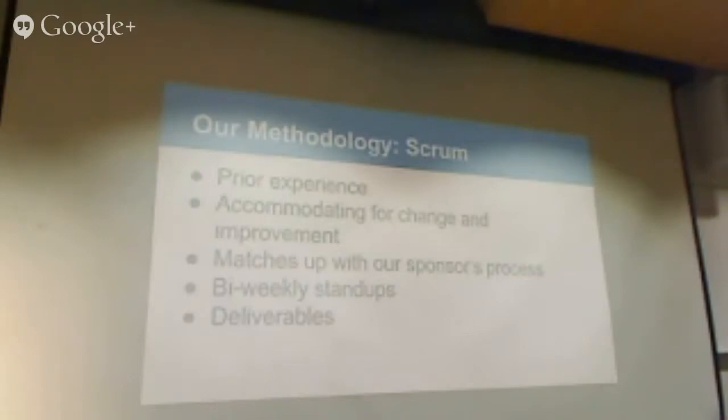And in order to implement this, part of what we do is bi-weekly stand-ups. On Tuesdays, we have an engineering stand-up with our sponsors, and we teleconference them. Usually for those stand-ups, we try to provide some sort of deliverable, whether it be documentation or an actual version of the app that they can install and see how that's working. Not every stand-up, but we try to provide something.